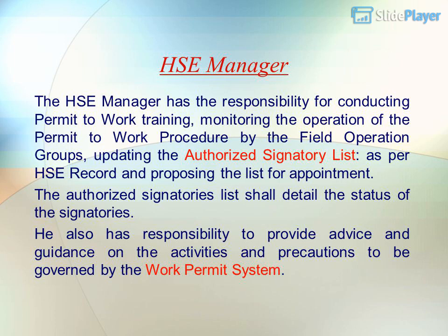HSE Manager. The HSE Manager has the responsibility for conducting permit-to-work training, monitoring the operation of the permit-to-work procedure by the field operation groups, updating the authorized signatory list, as per HSE record, and proposing the list for appointment. The authorized signatories list shall detail the status of the signatories. He also has responsibility to provide advice and guidance on the activities and precautions to be governed by the work